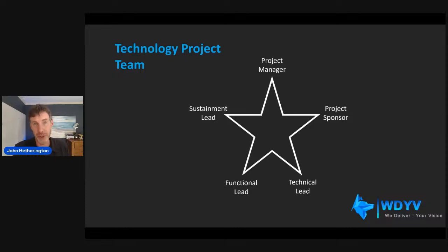This role is often forgotten. The number of times I come into a project to help accelerate it or help reset it, and we've not involved the sustainment team, which sometimes involves additional budget because we're not budgeted for that team to pick up the work afterwards. Again, the total cost of a project includes the ongoing support. And this is where the sustainment lead can help.